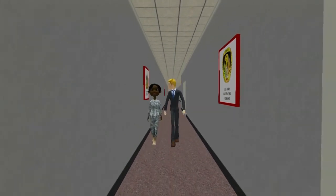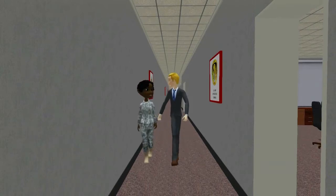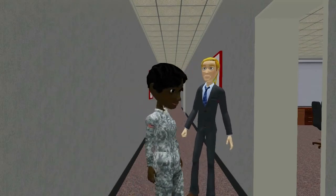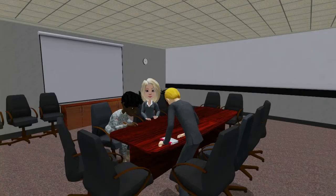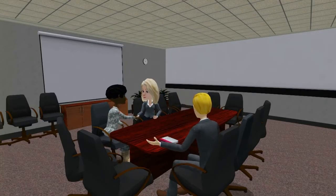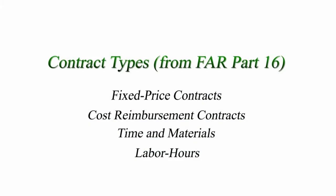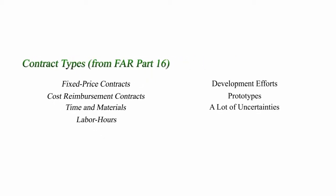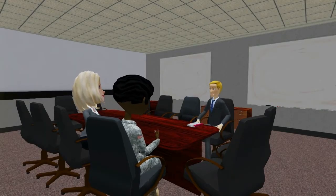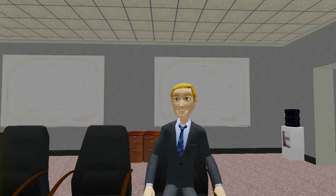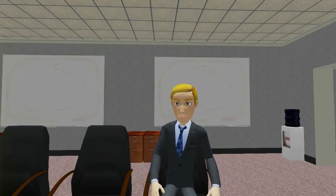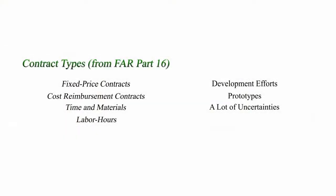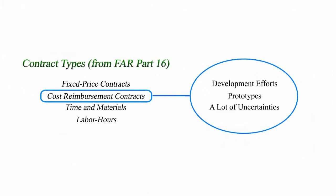So where do we start? Since we are talking about how much the contract will cost the government, I think we have to start by looking at the contract type. We are looking for a contractor to really push the envelope with this development effort — we want next-generation prototypes that we can then put through some rigorous field testing, which means there are a lot of uncertainties inherent in the performance of this contract. Since this development effort involves so many uncertainties that a contractor should not reasonably be expected to put a fixed price on, the most appropriate contract type is some sort of cost reimbursement contract.